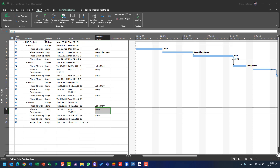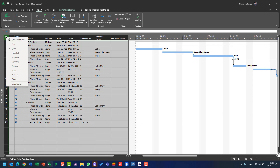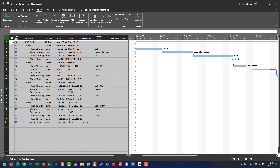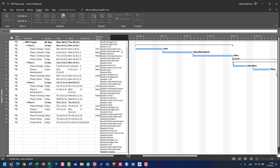Information is stored in tables. I can right-click here and have multiple tables — Microsoft Project has multiple tables. For example, this is the Entry table. In Entry I have information: task mode, task name, duration, start, finish, predecessor, resource names, and others which are stored in tables.